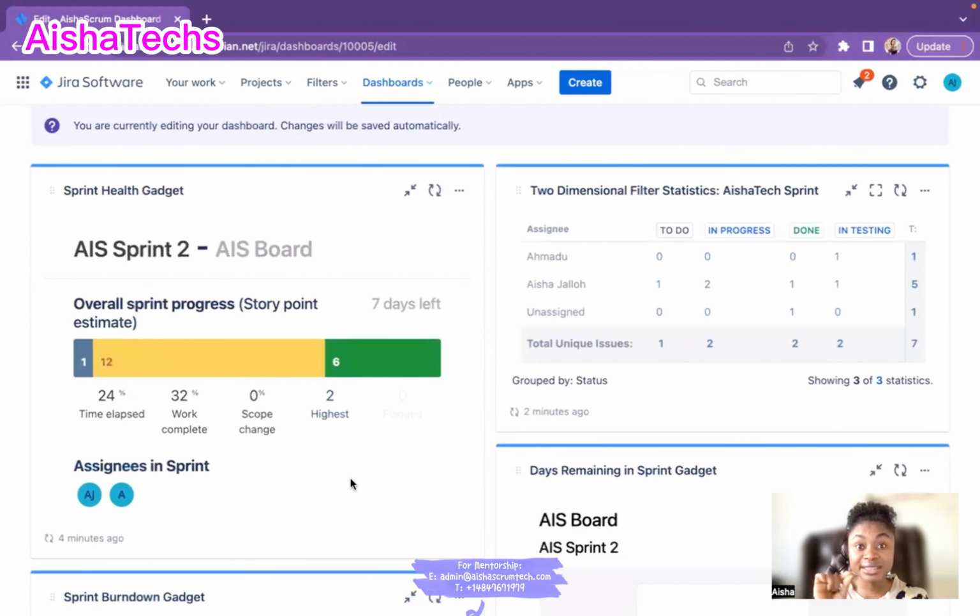If you use the basic JQL choosing a particular active sprint, sometimes to update this, let's say the new sprint starts, you might have to go back there and choose that active sprint, the new sprint's name. You have to do that. But if you choose the previous one that I created, the advanced one that shows open sprints, that one will automatically update because that's just the query for all open sprints. It wasn't particular to a sprint's name.